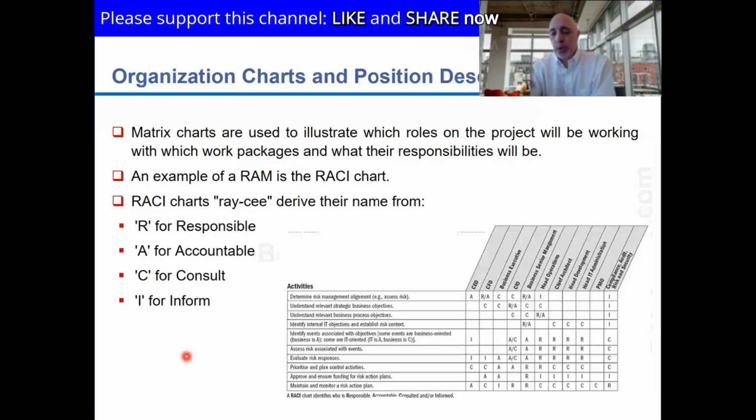Those are not things we put on the project, right? These are activities related to the project, but not project activities. These are administrative or oversight type activities. And so these might be things that I would include here. Here is just examples, so don't try to read them so hard. But I can put these roles here, and I will make somebody accountable for each. There's got to be at least one person accountable for every one of the tasks that I'm giving these people.